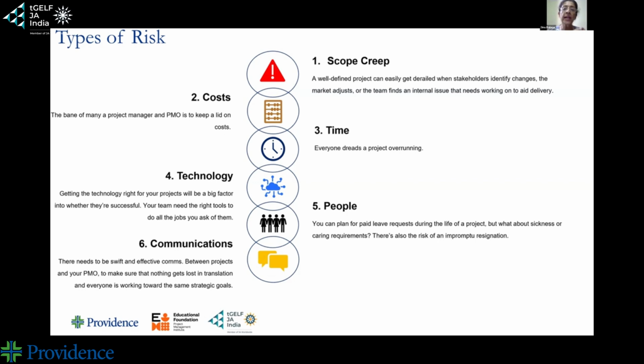So what you've done is, right at the beginning of a new project, instead of waiting for scope creep to happen and then going back to the drawing board, you know that this may happen, this may come up. So why not take that factor into consideration right in the beginning, in your initiation, project charters phase, where you're outlining scope and time of your project? Give yourself that little extra time right in the beginning.